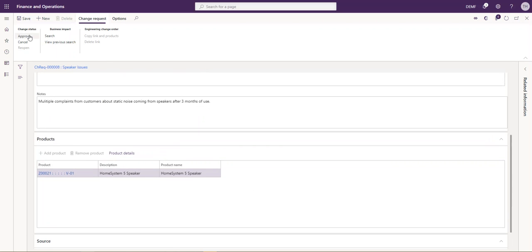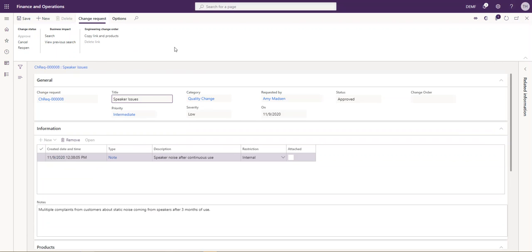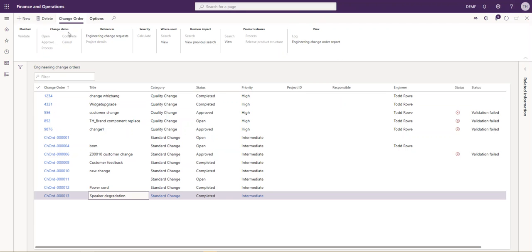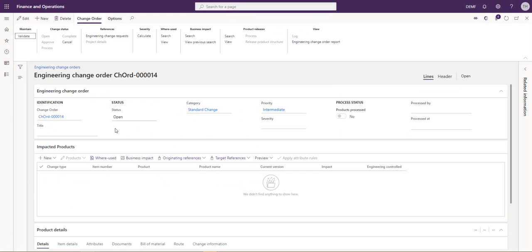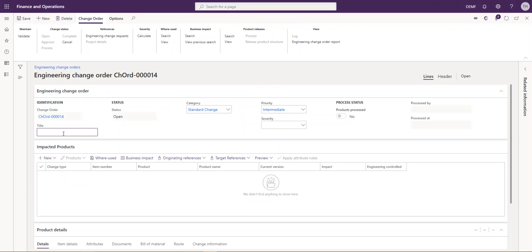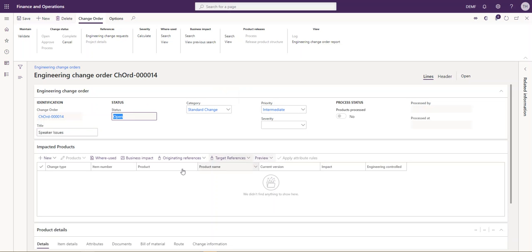As the engineer, I'm going to go ahead and approve this change request. From there, I need to start working on my new change order. We navigate to the change order area, create new, and start to fill in our information here. Give it a title, a category, set a priority and a severity level, and select the impacted products.